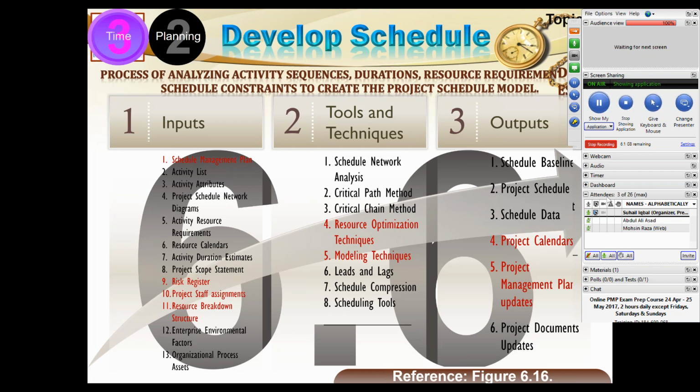He can enforce a tax. He should say that every activity should give me back this much time. Say maybe, a flat rule, every activity must contribute 1 day to me. I will keep it in my buffer and I will use it at my own discretion.